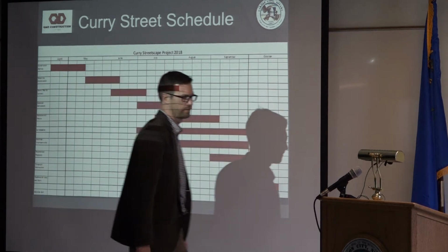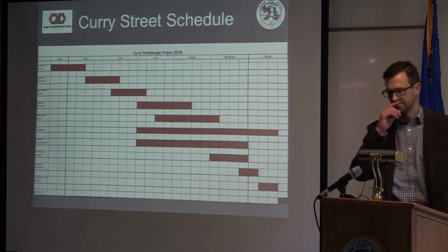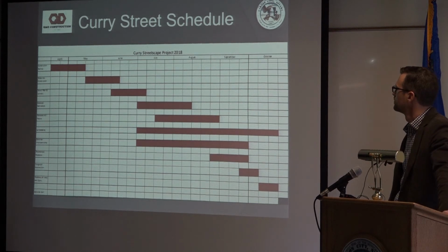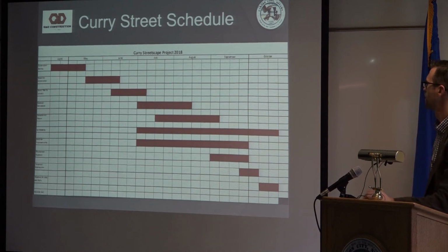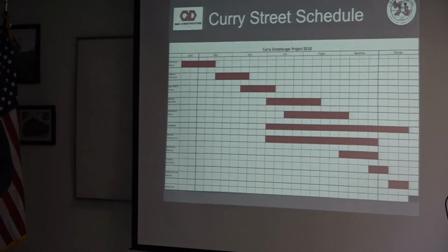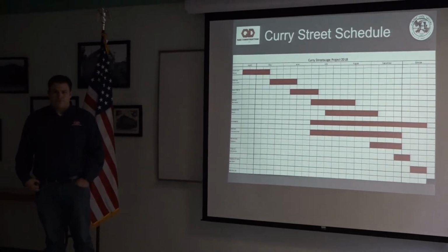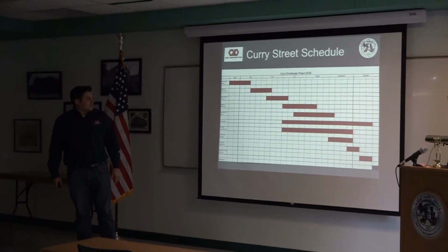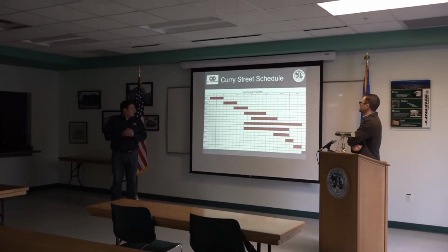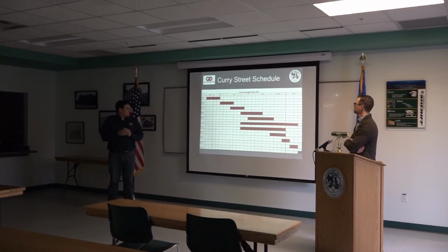Thank you, Dan. Again, my name is Fred Amesbury. I'm with Q&D and just here to talk to you about the schedule. Our proposed schedule is looking at starting somewhere in the middle of April with the mobilization and construction startup. We'll go out, pothole utilities, verify stuff, and start setting up signs and cones. Probably also a few no park signs, but we'll start with the water line construction.